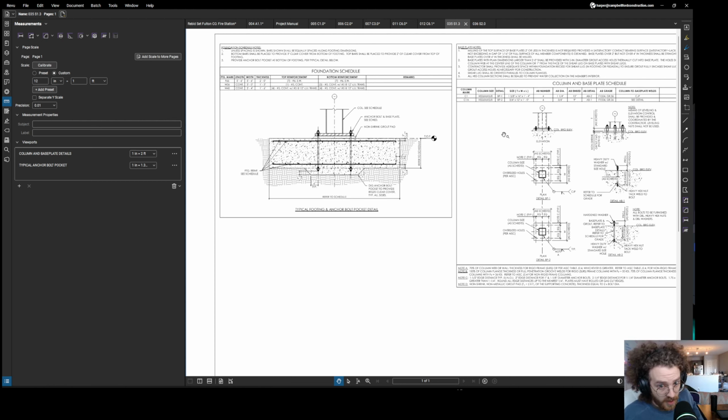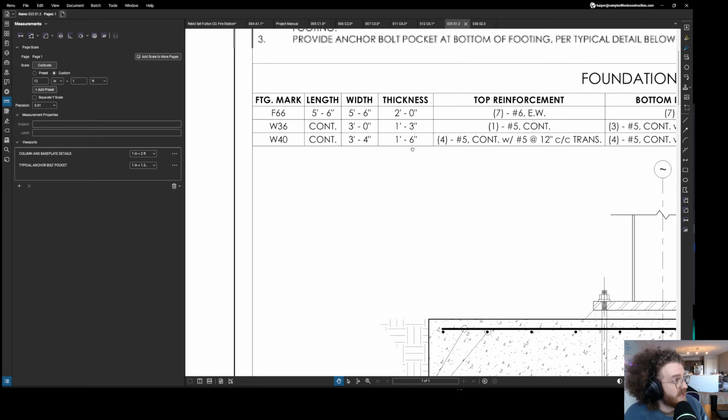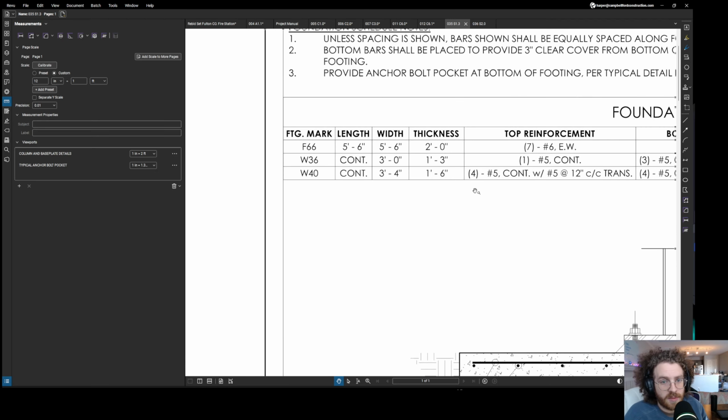We have to figure out what kind of footings are underneath it, how many linear foot of continuous footing there is, how many spread footings there are, what thickness they are, what their dimensions are, because you can end up getting a bunch of cubic yards in footings very quickly, and you can bust a job if you're not paying attention to the thicknesses and that stuff. So these are what we're going to be looking at whenever we start looking at the slab and taking off the foundation.